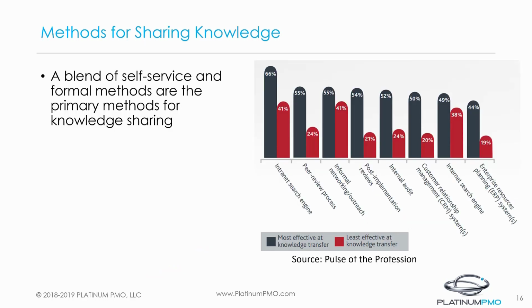According to the research performed at Prudential Financial, they leveraged post-program surveys to obtain feedback from key project participants throughout the business. They compiled and analyzed results to drive face-to-face follow-up meetings that dove deeper on what was reported, discussed what went well, what didn't, and how they could do it better. They then took it one step further by archiving the key takeaways and making that information available to other program leaders and project managers for future process development and to inform best practices.